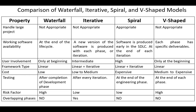Waterfall, iterative, and spiral models are heavyweight models, since they are process and tool-oriented models. They follow a predictive approach involving comprehensive documentation. Lightweight models, such as the agile model, are people-oriented models, following a decentralized approach, which makes them adaptive to changes.